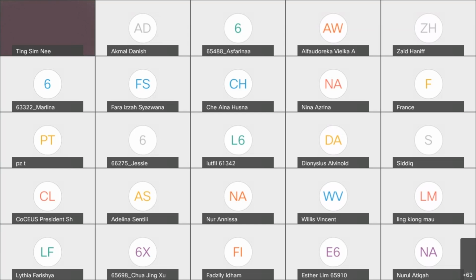and then when you go into even more detail, you do the EV technique. And from the EV technique, we also do a bit more on financial cash flow management. Cash flow management is about how much money for that month you are picking up from your client and how much money you're paying out for your expenses. If there's any negativity, you need to get the cash ready to tide you through those months that you may have negative cash flow. Most projects for contractors or suppliers will probably have negative cash flow for the earlier part of the project, and the money will only slowly come in at the later part.